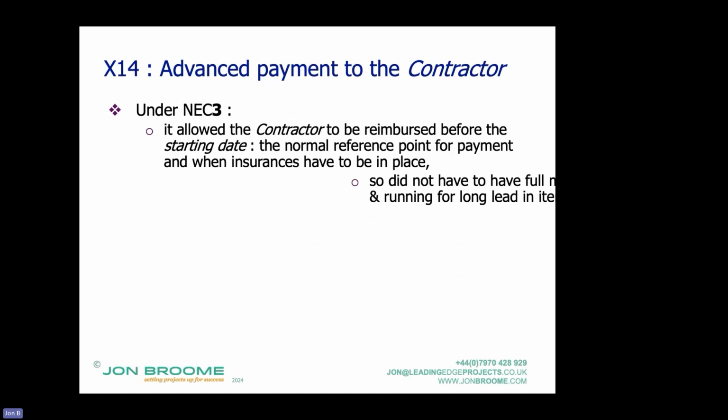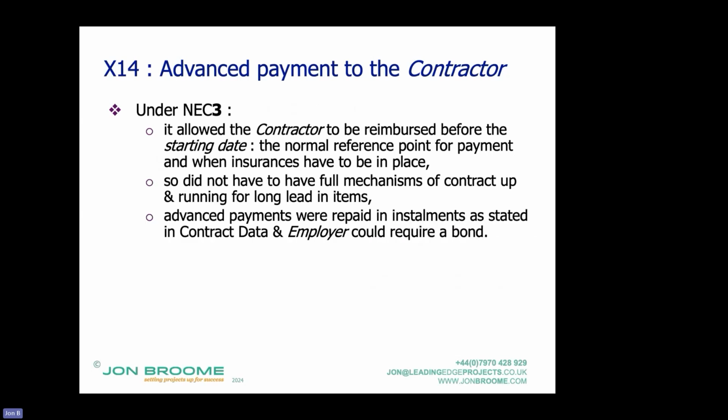Another one related to the previous one: the multiple currencies as advance payment to the contractor. And the reason why I've put this together is let's say I'm buying that tunnel boring machine, and I have to put down a deposit a year before I actually move on to site with that tunnel boring machine manufacturer. Now, under NEC 3, it allowed the contractor to be reimbursed before the starting date. So the starting date is when the contract mechanisms all come alive. Yeah. So the contractor's moved on site.